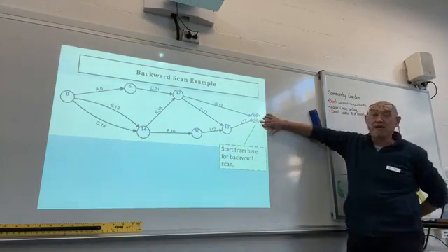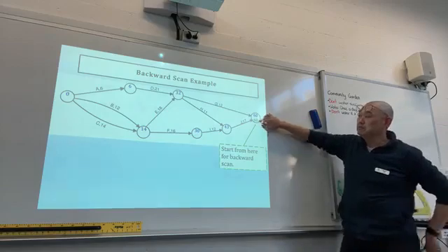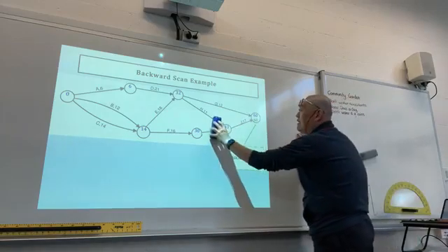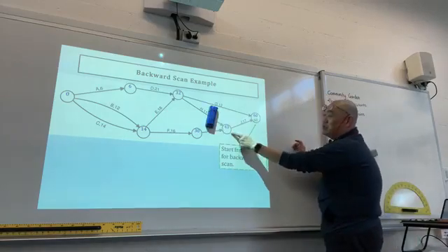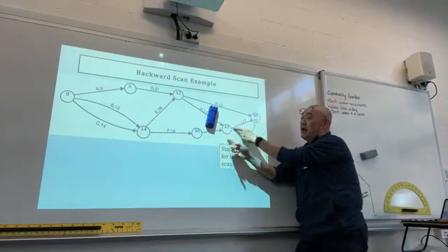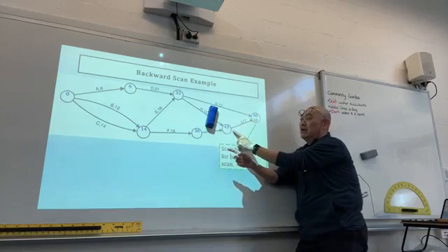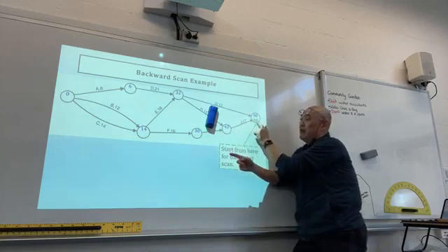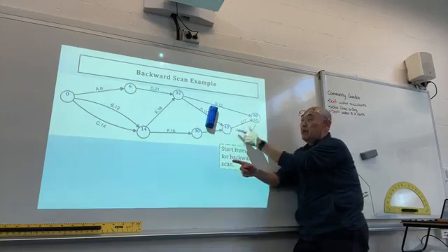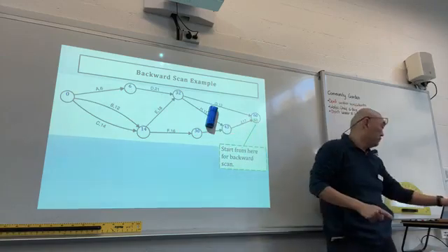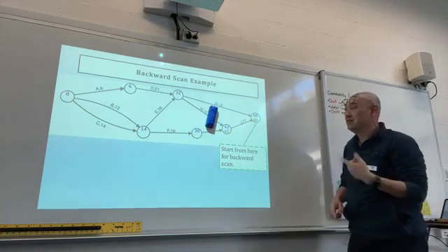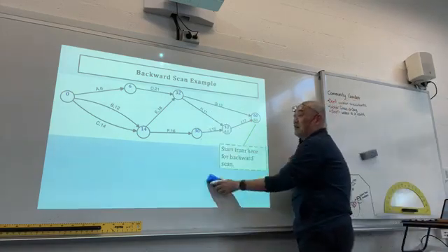You've got 60 here. Now, if we ignore everything else, this one, is there anyone coming back? There's only one edge or one arc. So therefore, it's pretty straightforward. 60 minus 17 will give you 43, right? So write down 43 here.